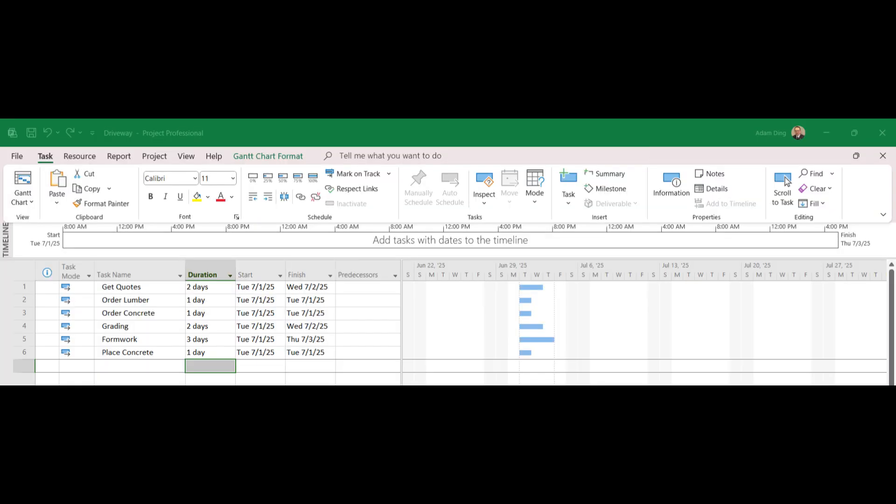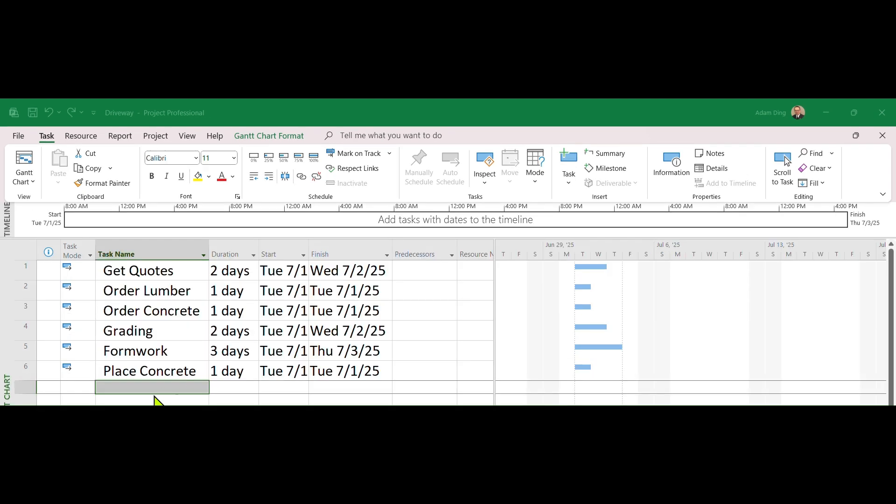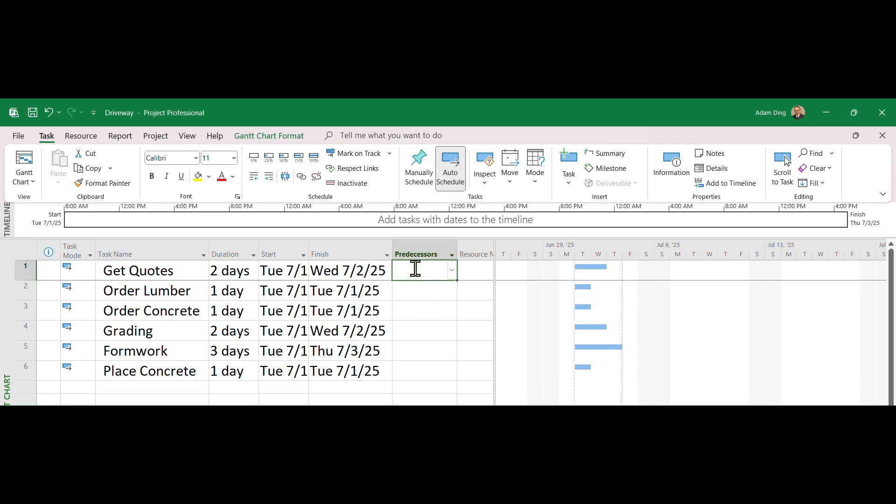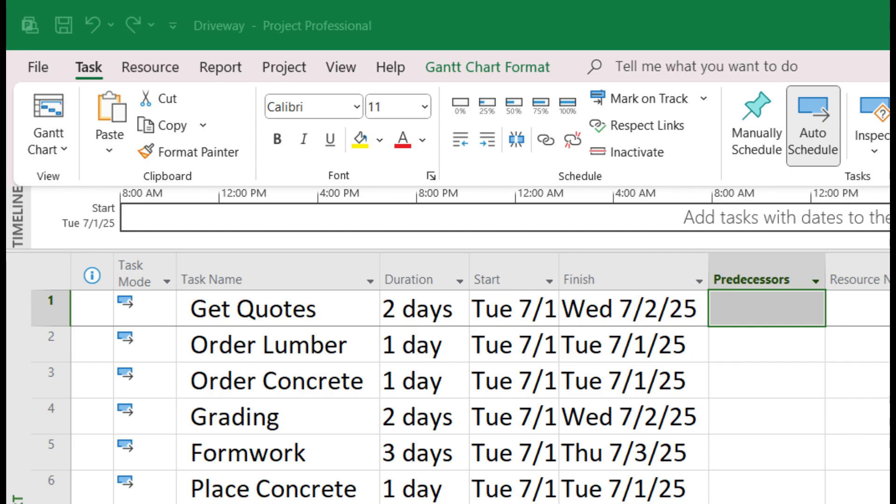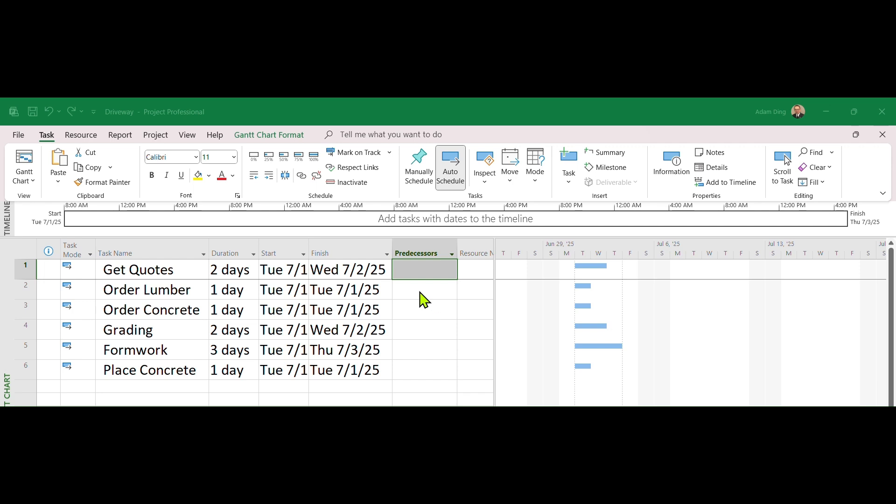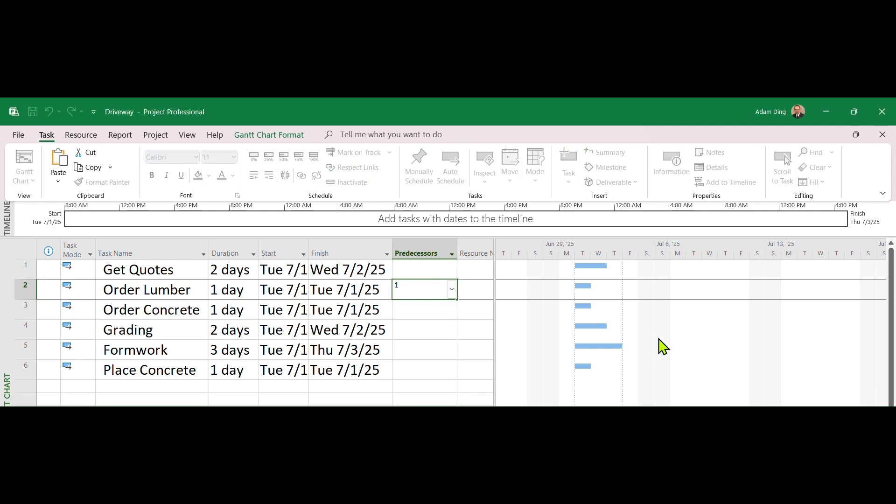The project duration is not just adding up all task durations. Otherwise you won't need the software. Move your cursor under the Predecessors column. As Get Quotes is the first task, please do not enter anything for the first line. Move to Order Lumber, type the task ID of the first task, 1.